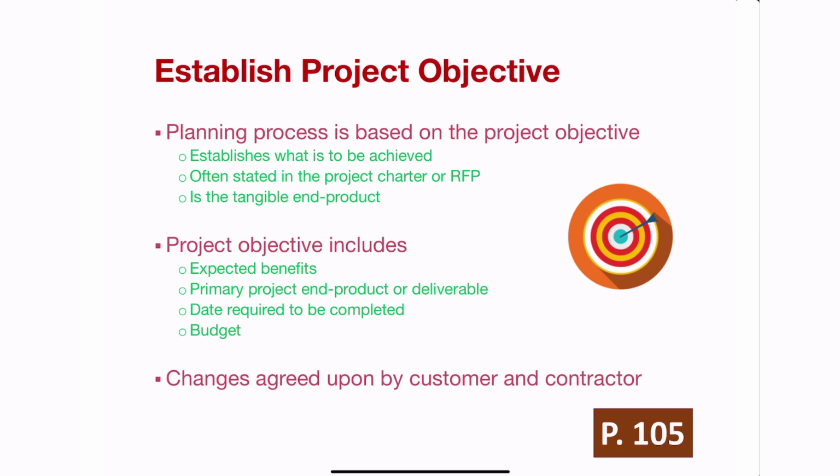The first thing you need to do is understand what the project objectives are. And these project objectives are not your objectives as a project manager or as a project team, but your client's or your sponsor's objectives. Generally, these objectives have been put together or will come from the project charter. You would have listed that in the project charter, and at times it can be a tangible end product. So if you are tasked with building a bridge, then the bridge would be your project objective, but sometimes it might even be an intangible project.